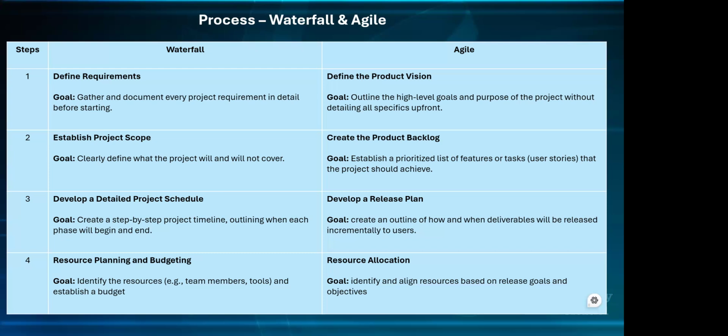So with the schedule and the timeline that you've put in place, you're able to discuss the resource planning. You're able to look at the tools. If you're going to subscribe to third-party tools, you know how long you're going to subscribe for, you know how long you're paying for. So the goal is to identify the resources, the tools, the human labor and everything, and then estimate a budget and put it in place to say, okay, this is what it's going to cost.